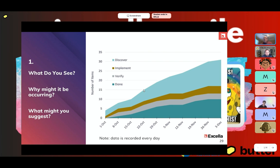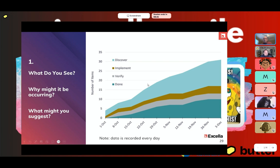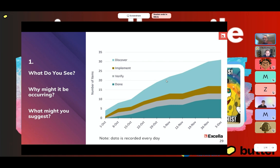All really good observations. You might suggest putting WIP limits on here. As an agile coach, you might have to go talk to upper management, or work with the team to help them understand that the number of items coming into your system should, for the most part, reflect how many items are exiting your system. We can see the slope of the arrival line is much steeper than the completion line — and not only that, but your cycle time is going to get larger and larger.